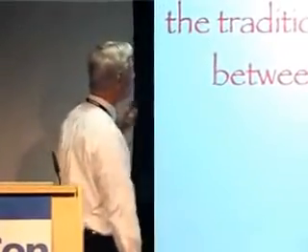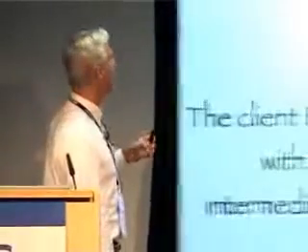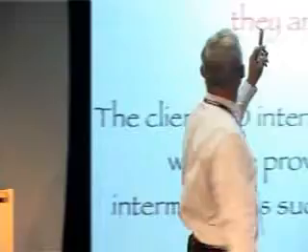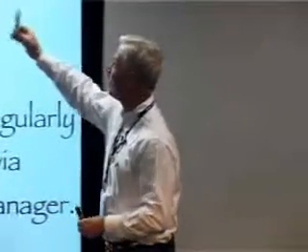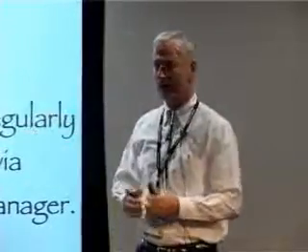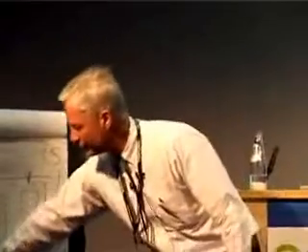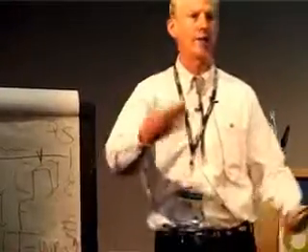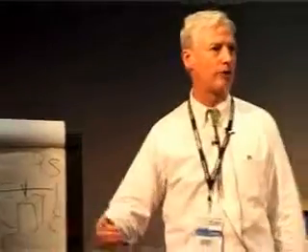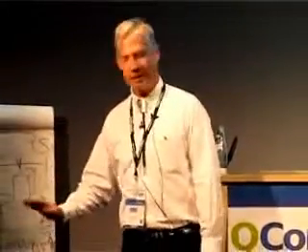And the key difference in customer collaboration is that the Scrum product owner is from the client. And they have ROI responsibility. They're the investor. So in Scrum, there is no project manager. As you know, in the 11th Agile principle is self-managing teams. There's no project or program managers in Agile methods or in Scrum. And there's no project manager in this model when you move to offshore development. And why? It's not because project managers aren't nice, handsome, skillful people. It's because the very presence of shifting responsibility to someone in R&D to handle the contract creates the organizational dynamics. It creates the system that will lead to all of these problems.